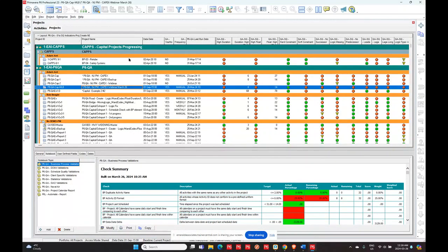If you've got a layout similar to this, all you have to do is take out the QA last run date, and P6-QA is polling these particular files. When it says QA yes, no, it's yes, so it's going to poll that file. So you don't have to worry about that. All you have to do is take out the last date and it will automatically say, oh, okay, I have to run this again. But you can set it to run automatically as well.